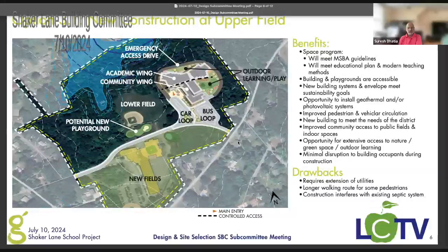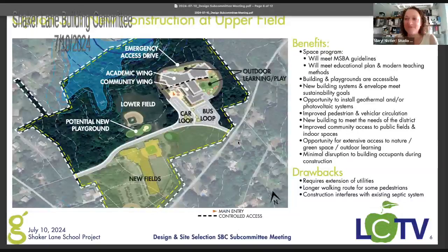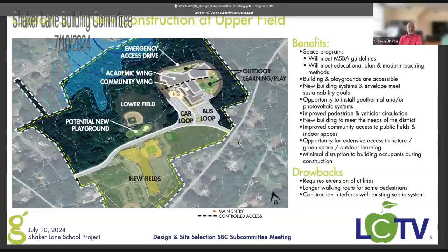My guess right now is somewhere between 45 to 50% total. And that too, again, is based upon the square foot cost that they allow. So if the total square foot cost is, let's say, $800 a square foot, and they have a limit of 600, it's 50% of the 600 and not 50% of the 800. There are too many formulas that get applied, and if your effective rate right now is, let's say, 50%, assume you're getting 40%. That's what I would start with. Don't expect anything more than that, because anything above that is just a bonus.